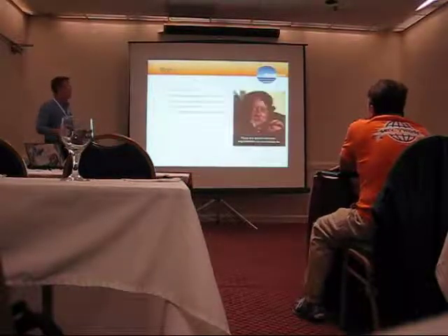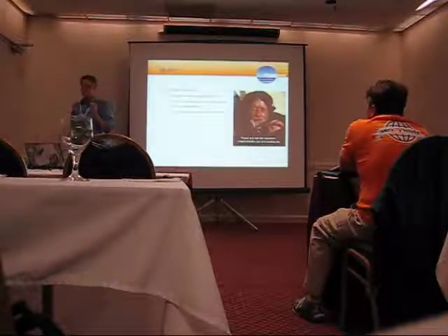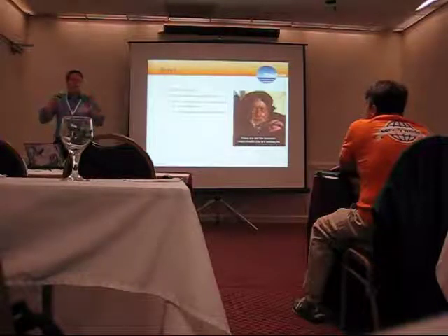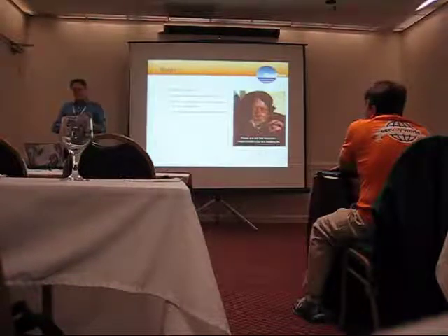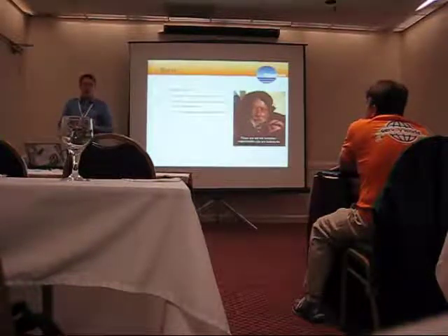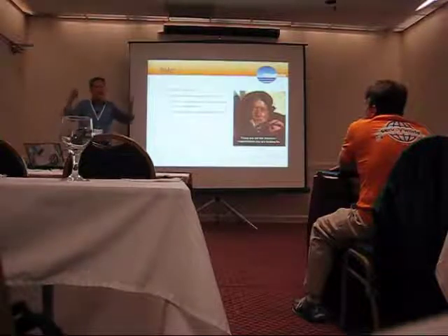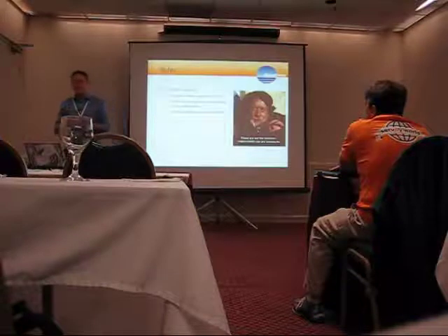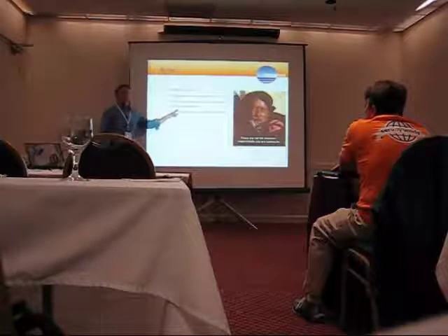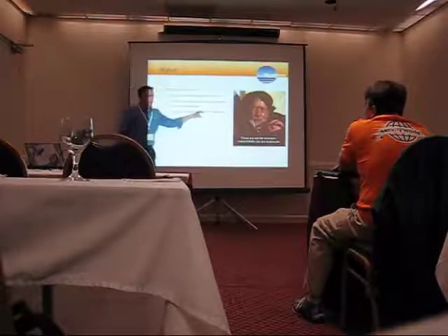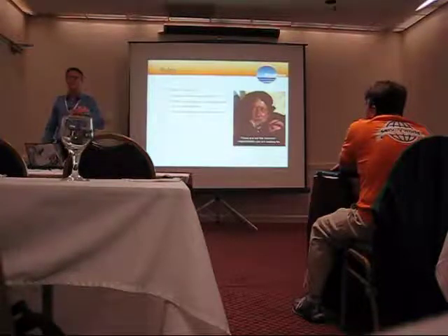So the roles would include the product owner. The product owner is a subject matter expert. Should know what he or she is categorizing, prioritizing. The product owner defines and gathers all the requirements from the stakeholders. So there has to be some interaction there, going to the stakeholders, asking questions, understanding what the needs are, and then prioritizing those. And the priorities are always set at the beginning of every sprint, or at the end of the previous sprint, either way. And the product owner is responsible for return on investment, for making sure that there's a positive ROI for all activities.